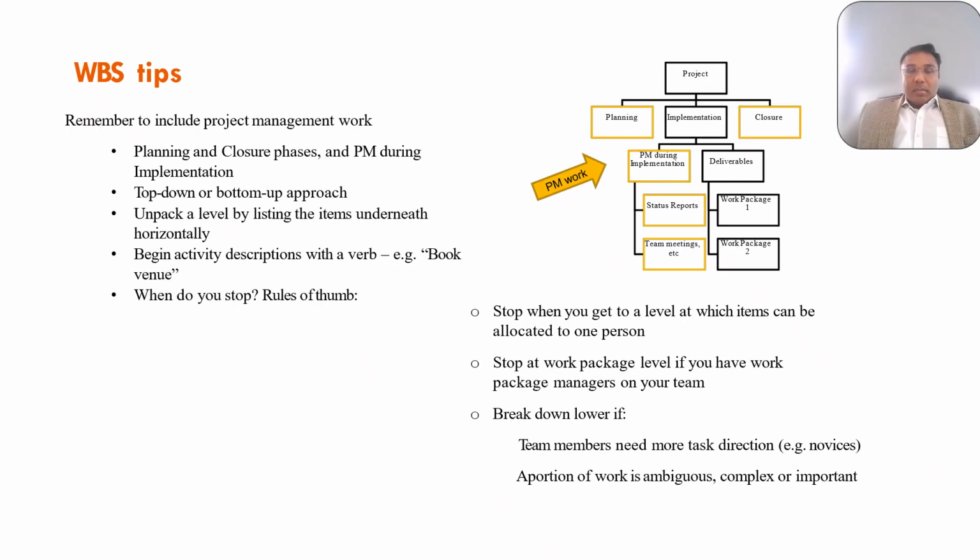Remember to include project management activities in WBS, such as planning, reporting, and closure. Use a top-down or bottom-up approach depending on your team's knowledge. Activity descriptions should start with verbs to clearly indicate the action. You can stop decomposing the WBS when tasks are assigned and measurable, either at the work package level or further down.